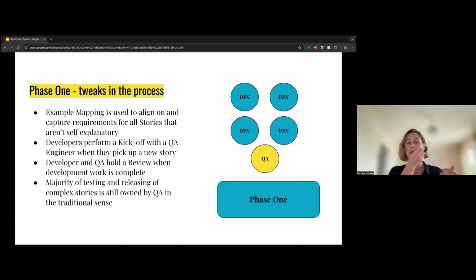And we moved from this phase. Every team moving from one phase to the other had their success metrics, for example, trying to introduce those reviews, kickoffs and sessions and trying to eliminate the column Ready for Test in Jira, right?